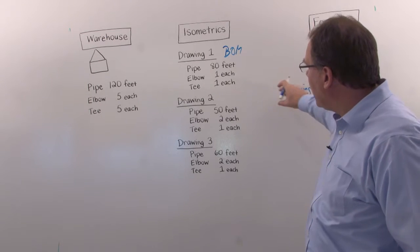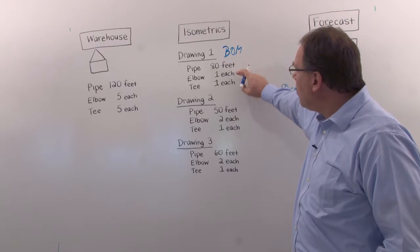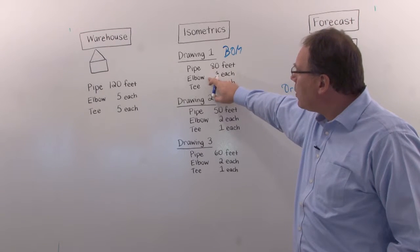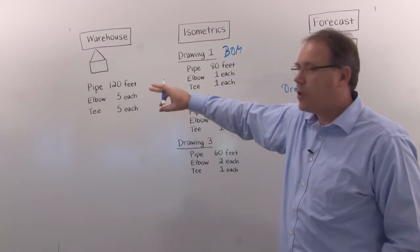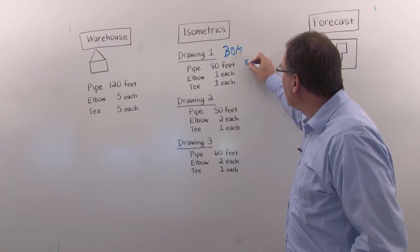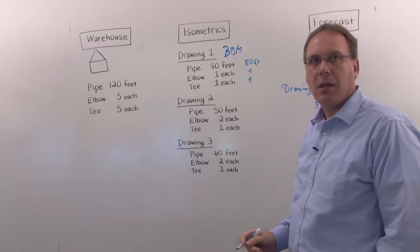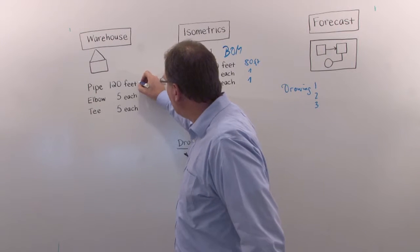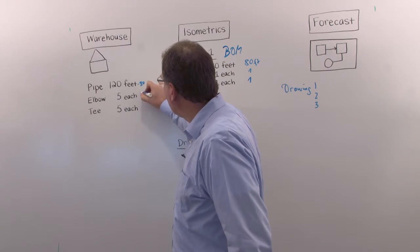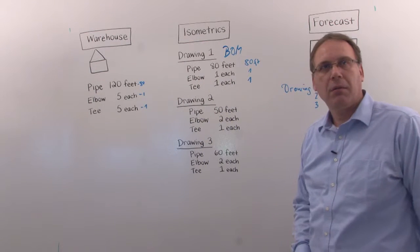So I take the first drawing. Here is the first drawing. I need 80 feet, one each of an elbow and a tee. Do we have 80 feet in the warehouse? Yes, I have 80 feet in the warehouse. So I have 80, I have one elbow and I have one tee. In parallel, when the system goes through, it will calculate minus 80, minus one, minus one. As you can imagine.